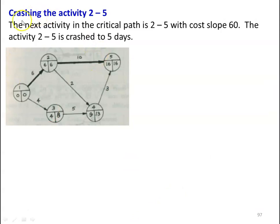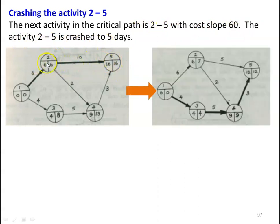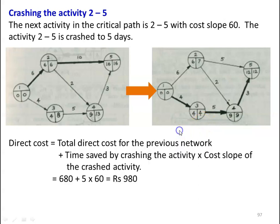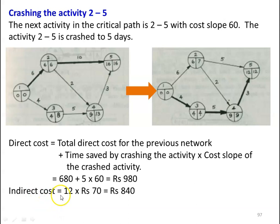Next, we crash activity 2-5, which has a cost slope of 60. Activity 2-5 is crashed from 10 days to 5 days. Recalculating TE and TL values, the critical path changes to 1-3, 3-4, and 3-4-5. The project duration reduces to 12 days. Direct cost = ₹680 + (5 × ₹60) = ₹980. Indirect cost = 12 × ₹70 = ₹840. Total cost = ₹980 + ₹840 = ₹1,820.